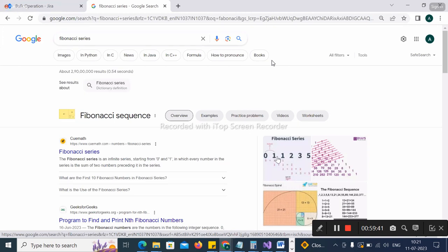Either give 1, 2, 3, 5, 8, 13. Like that you have to increase. So if you think that the project is very complex and will take much time, then you can give 8. 13 is very high, not more than that. If you think it is a very small story, then you can give 1, 2, or 3. If you think it is a very complex one, go with either 8 or 13. These all would be decided by your product owner. You don't have to bother about it. DevOps guys will not be taking care of everything. Just you have to create a task. That's all.